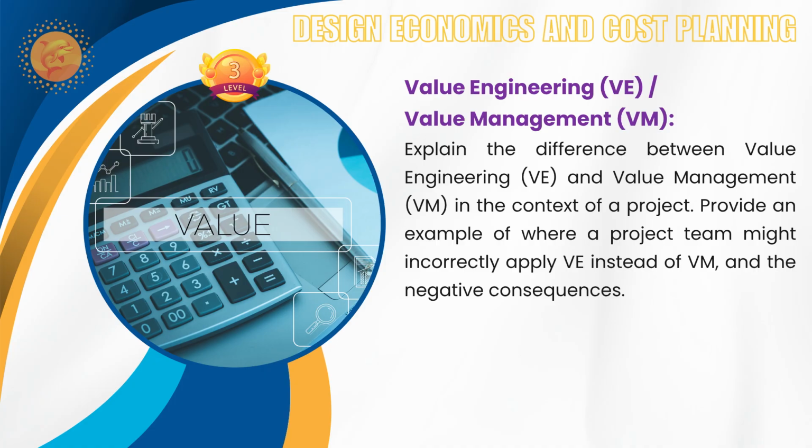And value management is multidisciplinary. That means requiring a workshop with diverse stakeholders, or often involves a facilitator. But value engineering is a single disciplinary approach for the elements, sir. Thank you for sharing your knowledge and experience.